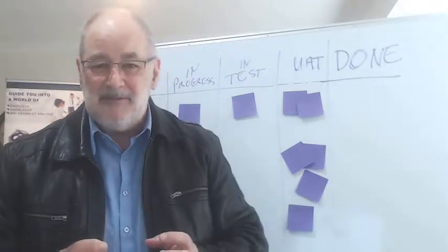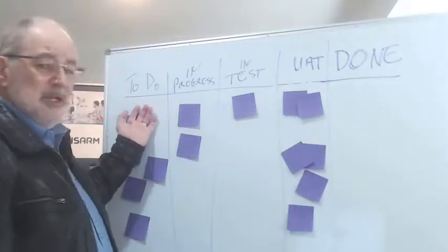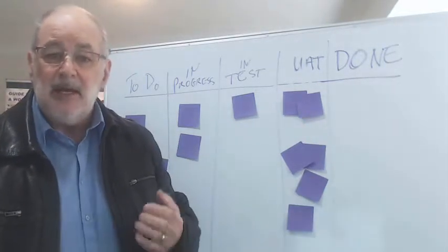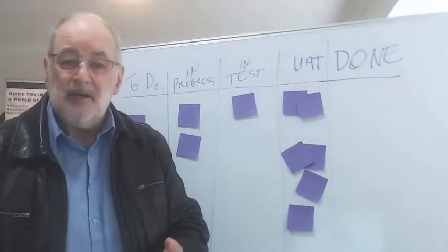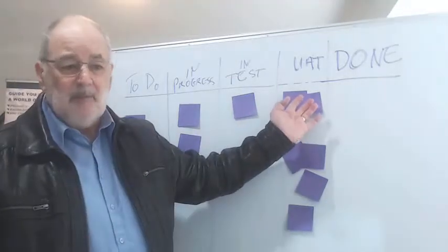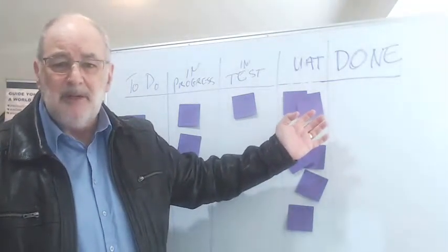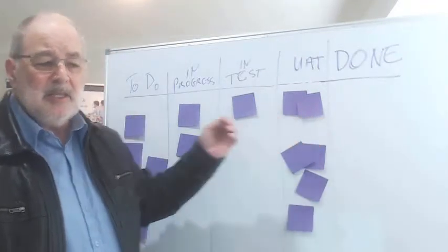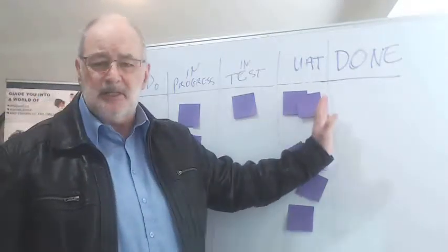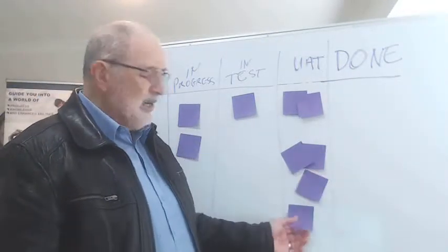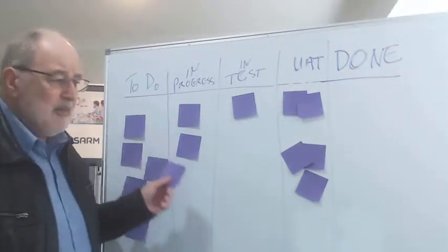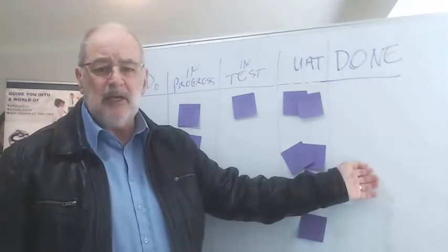There are benefits to that. It doesn't automatically go back into the to-do column to be rebuilt within this sprint. It can now be prioritized again. So your product owner can get involved and say, hey, this column's incorrect on our report. We need this to be done perhaps later on in the year. They've got something at the moment. There are other higher priorities that need to get done. You see, if it automatically came back and said, right, we need to go at it again, then items that might be absolutely essential in the sprint will never get done.